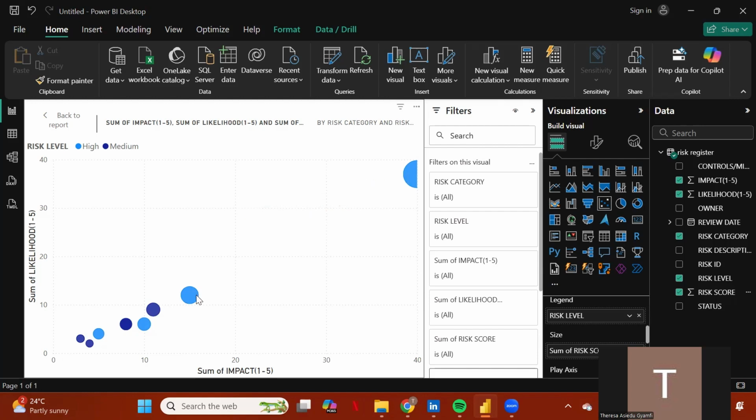Then you move downwards. So this is the second high or volatile risk category. And then the next one is vendor risk, the next one. So in applying resources to address the risk in your organization, you can use this chart as a help in allocating resources. So when you know that the one here needs to be dealt with ASAP, then you can allocate a lot of resources to the one here, which in our case is cyber security, followed by technology, followed by vendor risk, followed by operational, followed by insider threat, followed by technology, followed by operational.